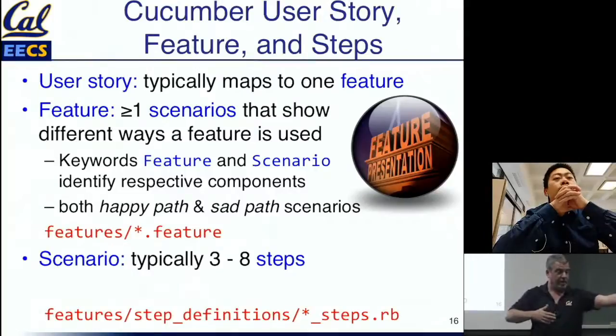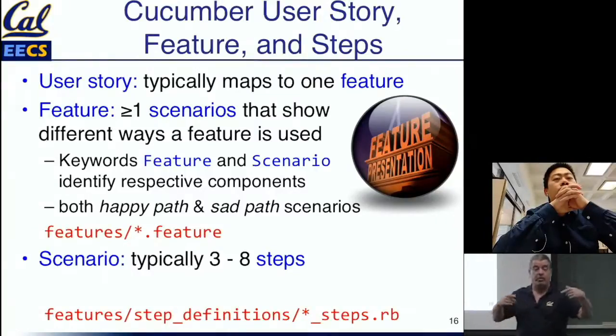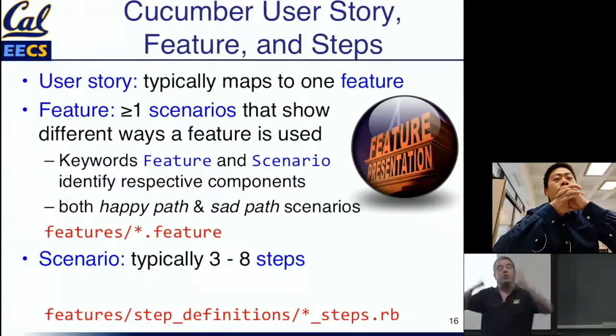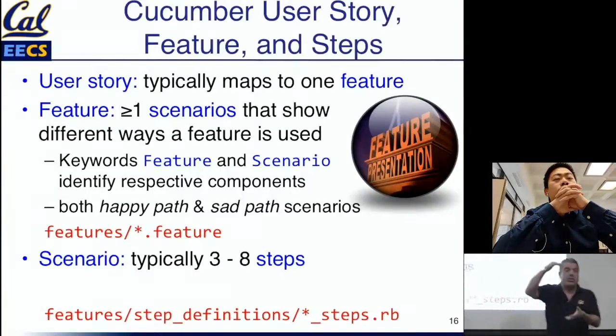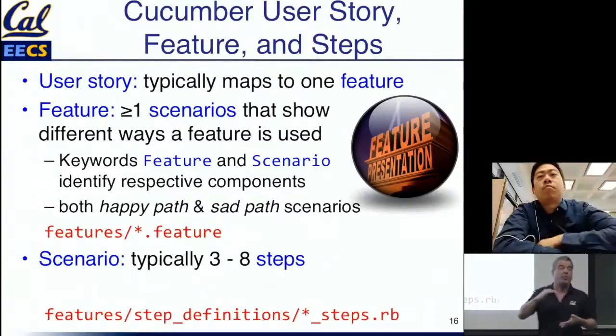It's not specific enough. It might not be specific enough, or even simpler than that, it might just be too big, right? Small stories are good stories. You can always take a big story and break it down into nice pieces that are individually testable, but if it really takes a sequence of like 20 or 30 interactions to express the story, that story is probably already too big.